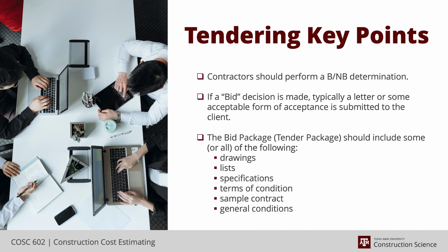The lists are growing in number and growing in completeness, where in FEL 2 you have a very conceptual equipment list, and that's pretty much it. By the end of FEL 3, you'll have a very refined equipment list. Some of the items are already potentially being purchased, the long lead items. The others are planned, but the trigger hasn't been pulled yet because it's not 100% that the project's going to go forward.